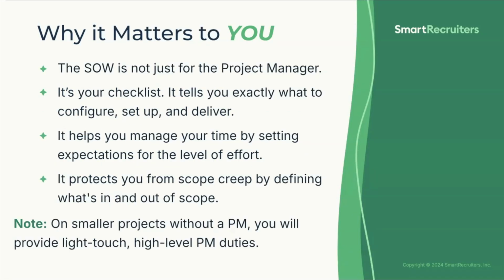So why should a consultant care so much about this document? Well, the SOW is your checklist. It tells you exactly what you need to configure, what to set up, and what to deliver. It also helps you manage your time and workload by setting expectations for the level of effort required. It's also your main defense against scope creep by clearly defining what's in and out of scope. In some cases, on smaller projects without a dedicated project manager, you will be the one providing light touch, high level PM duties, making your knowledge of the SOW even more critical.